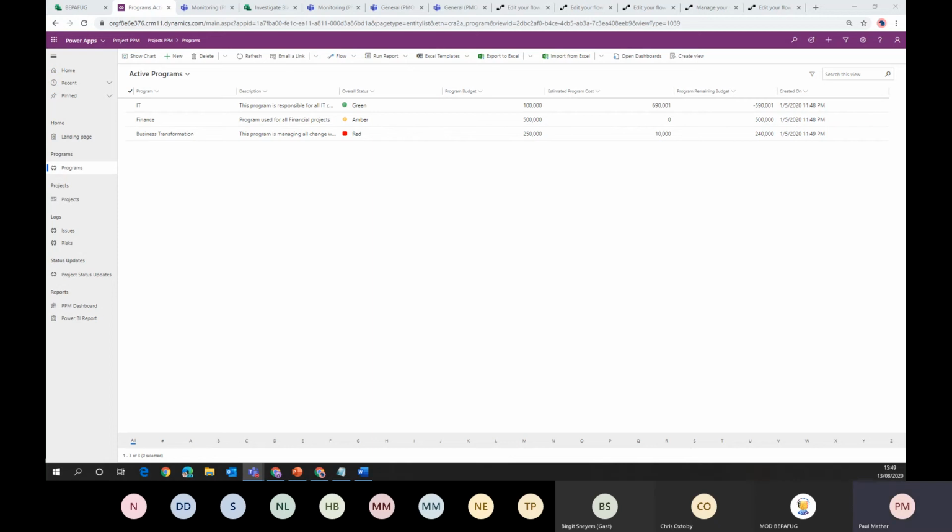There's a question there regarding time-phased data and baseline data in project for the web. Out of the box, there isn't any baselining capability. So that's where you would use a similar snapshot process using Power Automate or some other process to take a copy of that data, because all baselining really is a copy of certain bits of data within the project schedule.